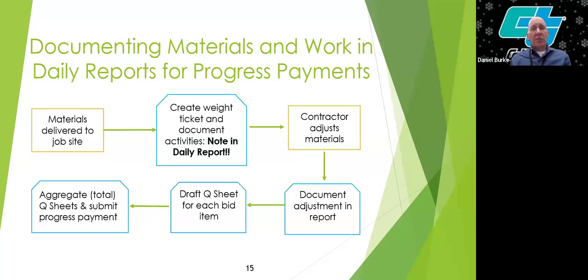Perhaps the contractor adjusts material. Perhaps they didn't think they need a full tonnage of asphalt concrete, so they might adjust it down or they might request a little bit more. So we want to make sure that those adjustments are noted in the daily reports and that it reflects what was actually installed and implemented onto the site.